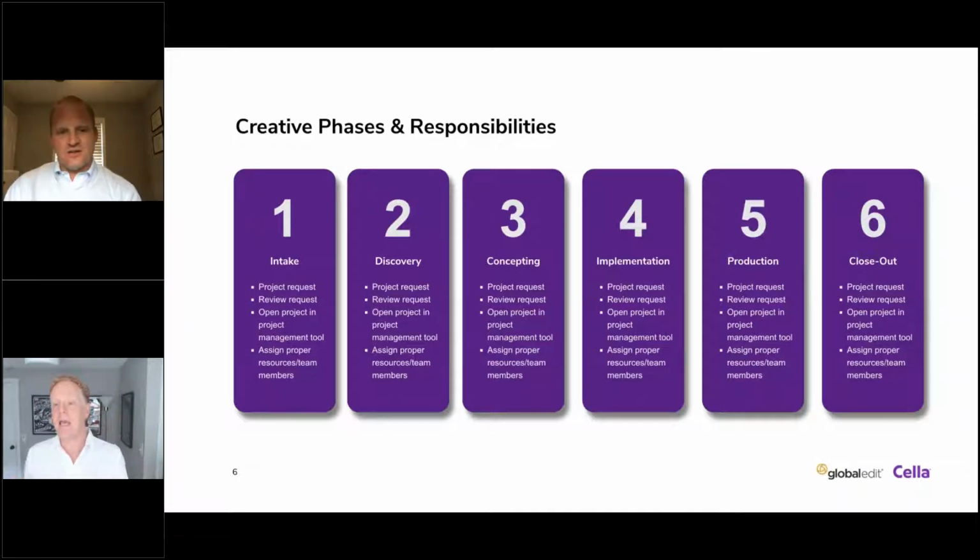But I think at the end of the day, pain, but then putting in a standard operating procedure allows you to report effectively on your overall output. And so when we put in procedure, when we put in this framework, it's actually not Big Brother watching you, or your hands are tied, you have to do this. This is actually the best way to create the argument for additional resources. If you can show that you are fully overutilized, or you don't have the capacity to deliver against the requirements, having a standard framework like this is your best tool up your sleeve to then show and justify the need for additional resources.